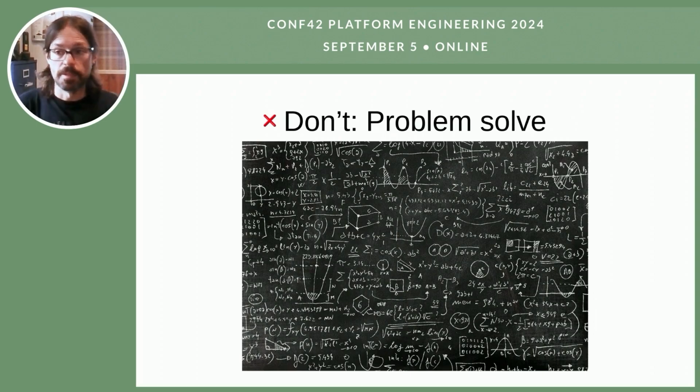That said, some don'ts. First, don't problem solve. That's something I've seen often, again, especially with engineers. We like to solve problems. That's basically our job, just solving problems all the time. So as soon as somebody says something, often you will have some engineer that will go in and say how we can prevent that problem. You have to stop them right there.